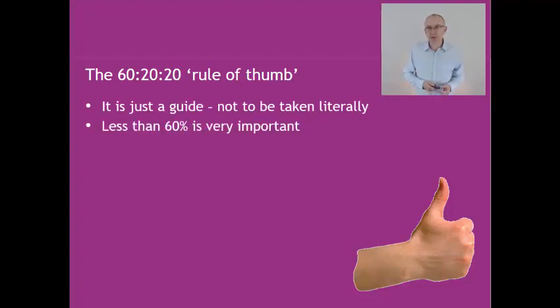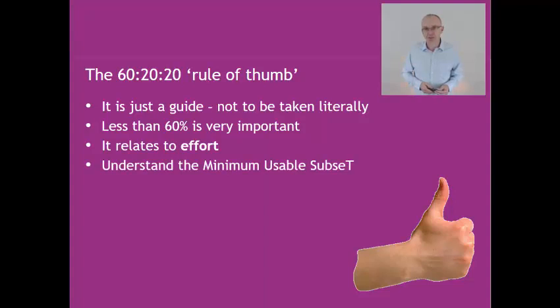One of the key values, just from experience and from everyone in the DSDM and Agile PM community, is this 60%. It just seems to be a nice sort of figure. Once you move over that and more of your effort is greater than 60%, it starts to get into some slightly trickier areas where the risk is actually going up. Now remember the 60-20-20 rule, meaning 60% musts, 20% shoulds, 20% coulds, relates to effort, not the number of requirements.